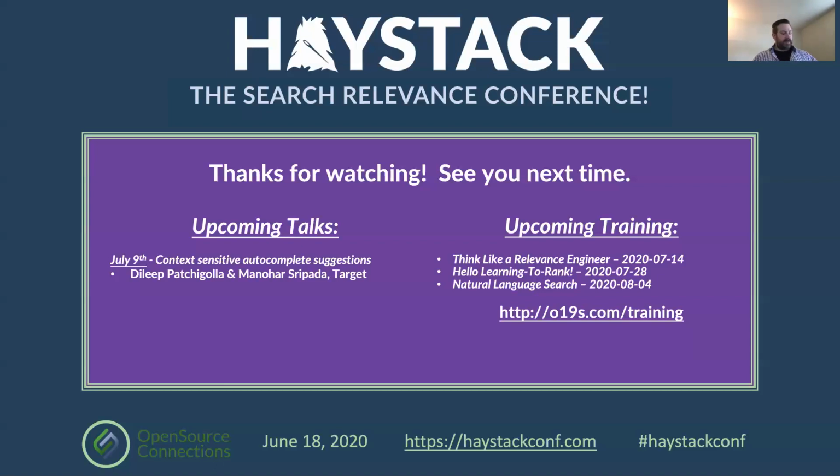Yeah, so I went through a bunch of migrations, and I've done a mix, right? My recommendation, based on my experience, is let them choose, because we did have a situation where we brought everybody over and it wasn't fun. We scrambled to fix things, and we lost some customers, and we got some angry feedback, and it took a little while to recover. Then with another product, people just gently migrated, and we did that.